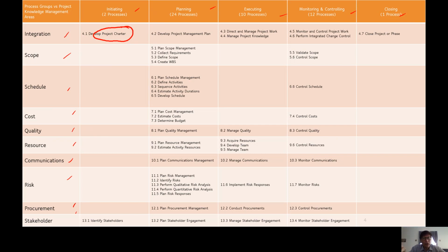Details in the project charter is usually very, very simplistic. Something maybe you draw from the contract. If you're a vendor, you're drawing from the contract that you sign with the customer, or if it's an in-house project, it will be the terms of reference, start date, finish date, what are the KPIs. Some people call it the SMART: specific, measurable, achievable, realistic, as well as time constraint. Those are called SMART, measurable objectives. If you cannot measure your project objectives, don't bother doing it. It must have measurements. Measurement means here a numerical number against a metric.